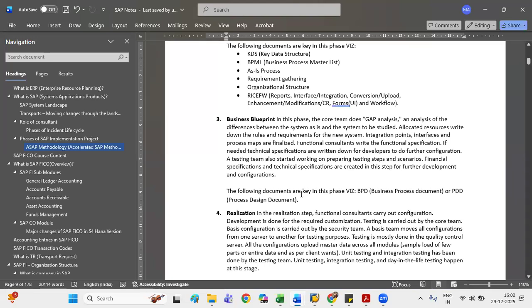In a similar way, they are working in agile methodology. Step by step, they developed the MVP first. Here as well, first you complete the MVP, the minimum viable product, which is the minimum requirement the client needs to go live.